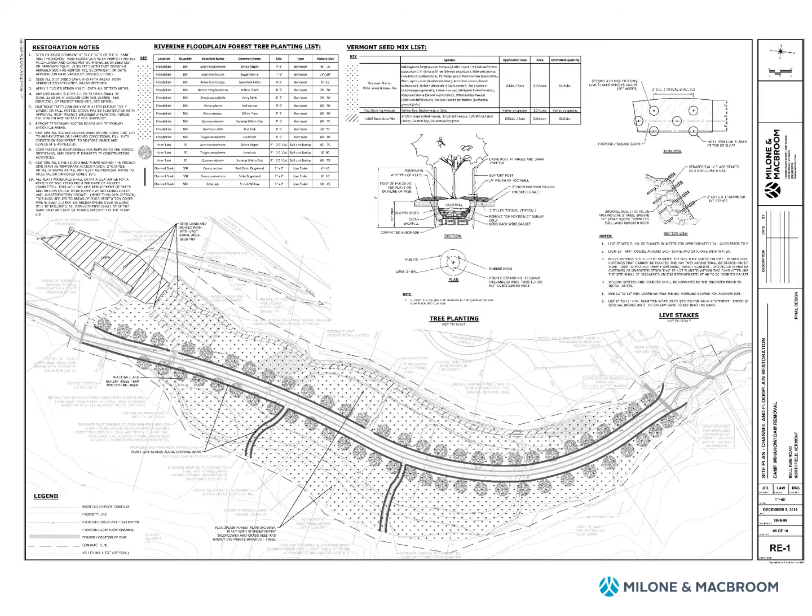Note that there's a special seed mix. It has a long lead time and is more costly than many typical seed mixes, so I want to bring your attention to that. And the fact that the special seed mix will be mixed with an annual seed and also applied at the same time.